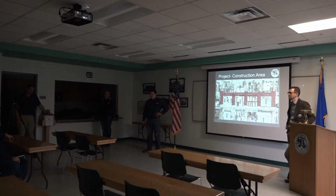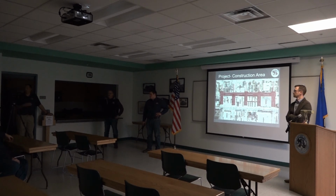And cleanup. Right now we're having major issues in that area with lots of debris, screws, nails, roofing nails. We have equipment all over the floor. An employee had to replace 4 tires on his car. We're paying a lot of flat tire bills. There will be a sweep, 2 or 3 times a week we'll come through and sweep. Our big issue isn't nails and that kind of debris, our big issue is dirt and soil, so we've got environmental issues and asphalt chunks. There will be a loader, probably every day the loader will go through and try to clean the road off, but it'll just get the majority of it, not the last 10%. And then a couple times a week, the sweeper will come through and sweep the surrounding area.